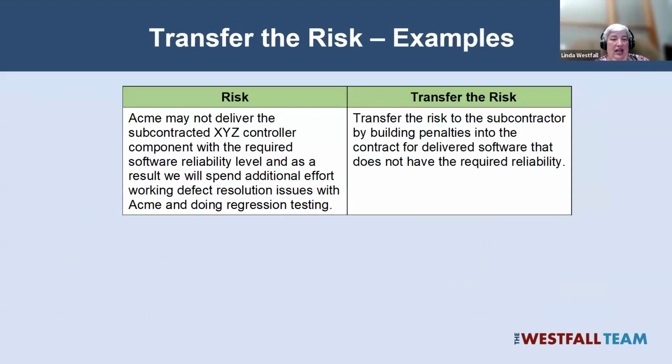So again, just as an example, for Acme, low reliability, subcontracted component, we can transfer the risk to the subcontractor by building potential penalties into the contract.